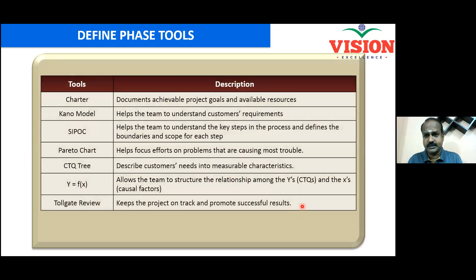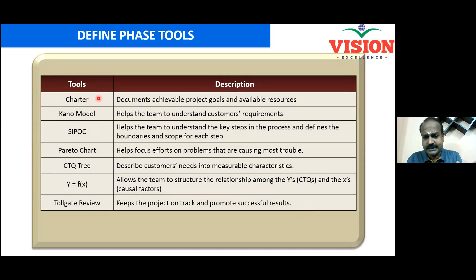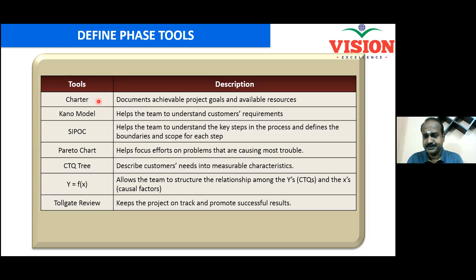There are several tools you can use to get these questions answered effectively. The first one is the project charter — nothing but an executive summary of your project. A one-page document that clearly talks about the problem, business case, scope, goal, team members and key milestones. Any top management reading your project charter quickly can approve your project. Add visuals to make it impressive — one or two pages maximum.